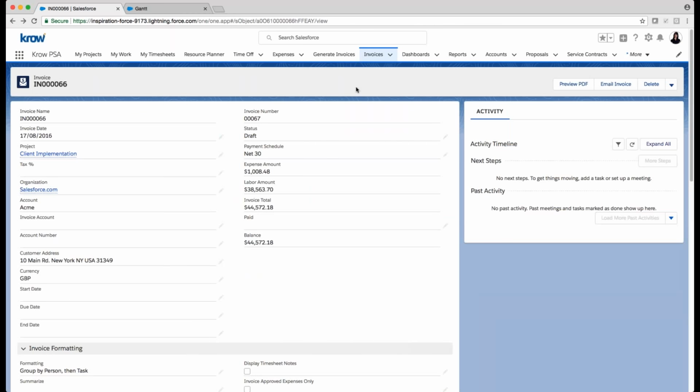But this is an example of I'm managing those billable projects, and now I'm creating billing events and sending those invoices to the client. This is a sales invoice. What I'm not going to focus on today is we also support the vendor bill side. So you can pay back your vendors, so that would be a bill, and integrate that to your accounting system as well for what you owe back your vendors or independent consultants for their work on your client projects as well. So that's a vendor invoice, as we call it, producing what's called a vendor bill.